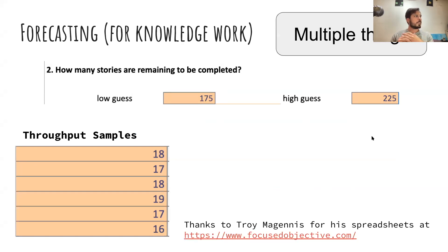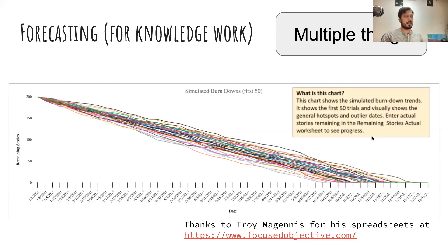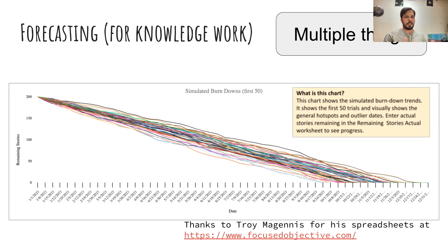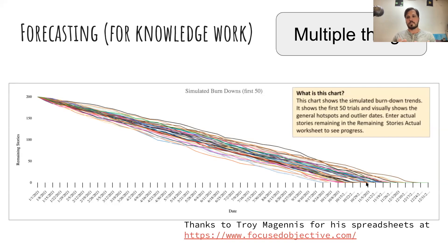For multiple things, we can create a forecast as well — it's a bit more complicated. We need a guess of how many things there are, and a set of historical throughput samples — throughput being the number of things we get done in some time period. Once we have those samples, we can create a simulated burndown, very similar to the simulated hurricane paths. We can draw a line where 85% of these burndowns finish before that line and say we'll be done with this bucket of work by this date with 85% confidence. This is called a Monte Carlo simulation. Troy McGinnis has free spreadsheets available at focusedobjective.com to help run these forecasts.